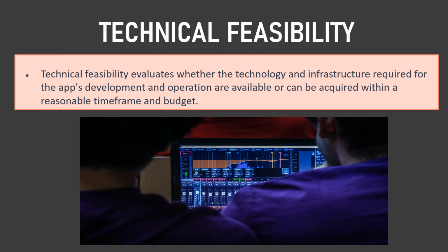What is technical feasibility? This aspect evaluates whether the technology and infrastructure required for the app's development and operation are available or can be acquired within a reasonable time frame and budget. It involves considering factors such as app development platforms, programming languages, required APIs, database systems, and potential integration with third-party services. The technical team will assess whether they have the expertise to build the app or if they need to